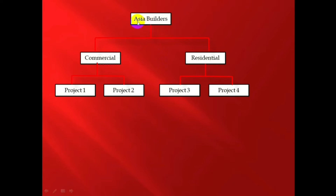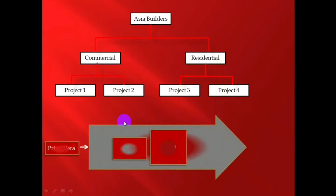At the top there is Asia Builder. Asia Builder has two types of projects: residential projects and commercial projects. Under commercial there are different projects like Project 1 and Project 2, and under residential there are different projects like Project 3 and Project 4. This structure is called EPS.